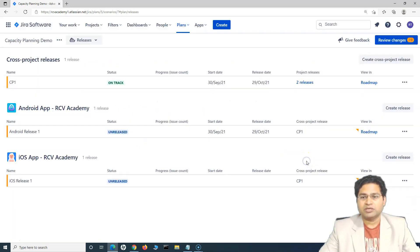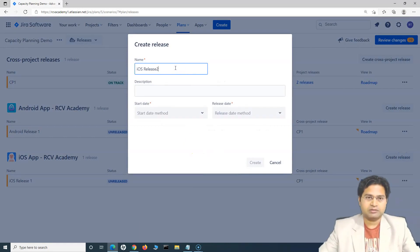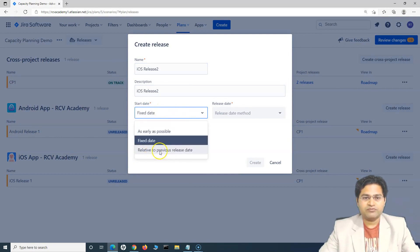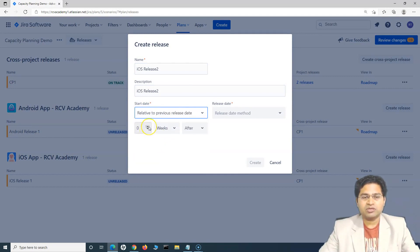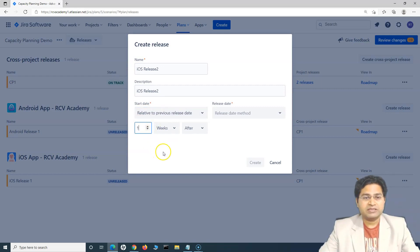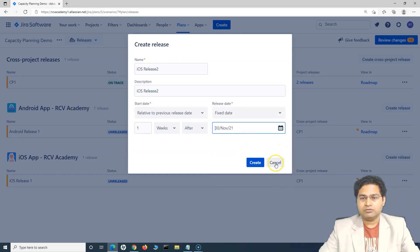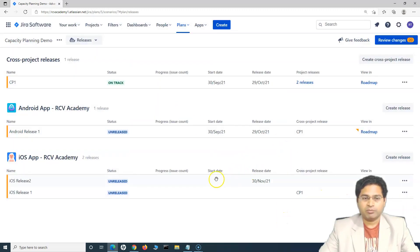Let me create one more iOS release — say 'Release 2'. If I choose 'relative to previous release date', you can choose how much time after the previous release this next release will start — say one week after. Then the release date will be fixed, so let's say 30th of November. So now there are two releases added for iOS.